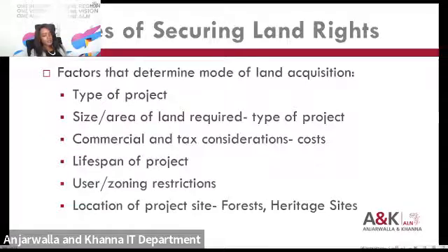Then the commercial and tax considerations will also factor in. That will be the tax considerations for the acquisition of the land. If there's an outright purchase, there could be stamp duty obligations, unless the project company is able to secure some sort of exemptions from the government. The lifespan of the project will also determine whether you lease or you own land. As I said before, if it's a short-term project, then it's likely that the project company will take a license over the land or lease the land. If the project is a permanent project, then it's likely that there will be an outright acquisition of the land.